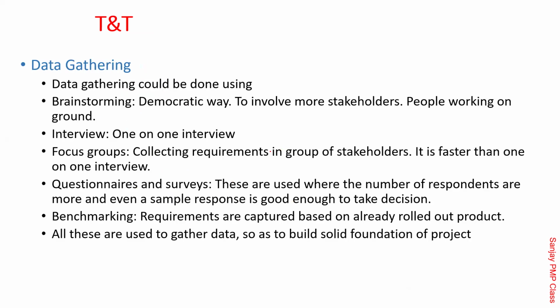Data gathering: collect requirements is all about gathering. So there are a lot of data gathering tools like brainstorming, interviews, focus group. As I told you, interviews are good for senior people. You can ask probing questions. The answer of one question will lead to another question. So a series of multiple questions could come up in an interview. That becomes difficult in other formats like brainstorming or focus group. Focus groups are brainstorming in particular groups. Brainstorming is a little random, a more democratic process.